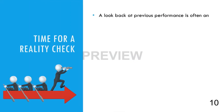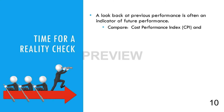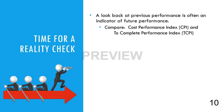Often, a look back at past performance can provide insight into future performance. This method also provides a means of checking the realism of the EAC. This can be done by comparing the cost performance index, or CPI, to the to-complete performance index, or TCPI, to provide the reasonableness of the EAC.